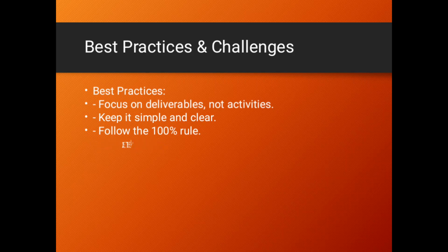From there, you need to follow the 100% rule. That means each and every task that is supposed to be done in a project is supposed to be included. That is 100%. You shouldn't leave anything outside that particular WBS. From there, you should also use a template. A template can be a document from a past project which is similar to your project. So that one will act as a guide on your project.